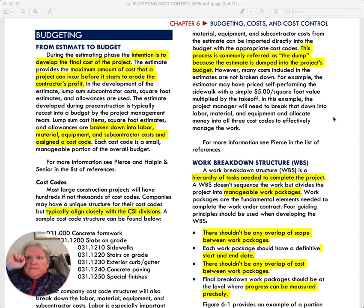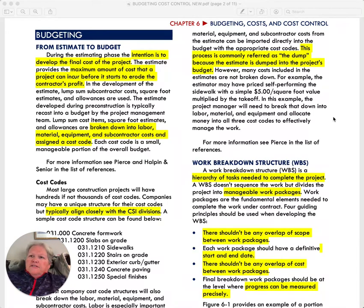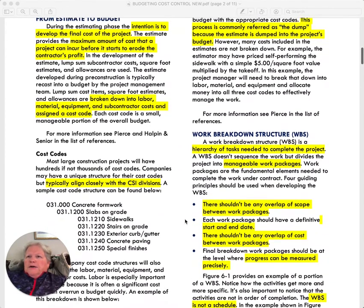Some of you may already be working in an estimating function or cost management function, but when you do, these will be the kinds of things you'll be dealing with. The most important aspect is to understand that your system goes from the estimate to the budget, and there needs to be compatibility from one mode to the other. In estimating, we've used CSI codes, and budget codes are often set up to align with those.